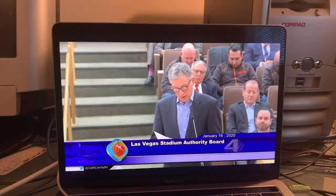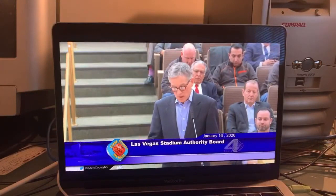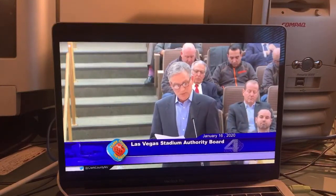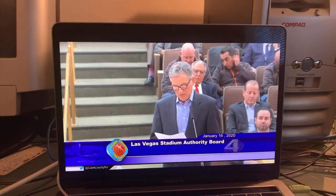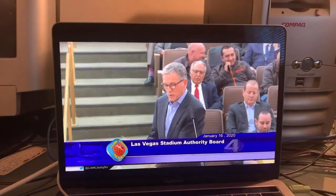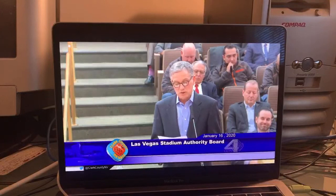With the exterior wall in place and the steel canopy roof, which covers the concourses, suites, and concessions, the highly finished areas are protected against the rain. The remaining portion of the roof open to the rain, the ETFE area, resides above the concrete field level floor and portions of the concrete seating bowl treads. Rain falling upon the field level concrete floor or concrete seating treads, which are sealed and caulked precisely so that they will shed water when the building is washed down, is hardly a showstopper, especially when the normal rainfall amounts to less than 1/4 of an inch during that entire month.